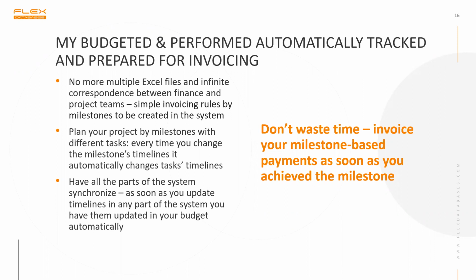And not only that, you guys want to have your trial tasks updated automatically as soon as the milestone dates change. Because, okay, let's be honest, how often do the timelines of the project milestones change during the study? Well, folks, we all know how this works in real life. But with this good looking feature, now the dates of the tasks connected to a milestone will change automatically according to your milestone date changes. Let me just run a quick example here. Say you had a first subject in milestone in your project planning and the budget accordingly. So you change the date of the milestone, and the dates of the tasks will change automatically as well.